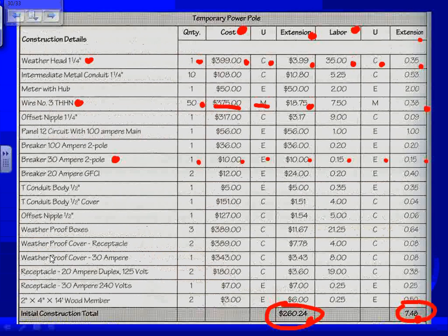That's what estimation is. The good news is, Chris, when you have estimating software, you wouldn't see this. This is all in the background. The extending, you pick certain things and it's assigned. You can change it if you want to, but if you don't want to change it, the minute that you pick a receptacle, it's assigned a dollar value and an hour value. And all you have to do is pick how many of them, and it calculates everything for you. Okay, so this is takeoff.